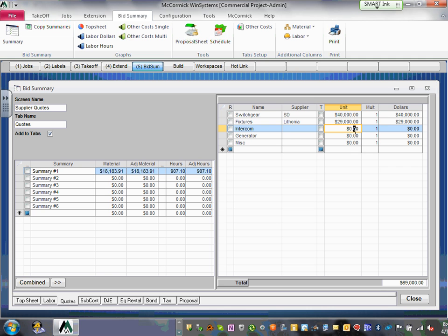Now, where would you get this number? You send it to 4 lighting vendors. Your lighting schedule, Adam. You put your lighting schedule, and they give you 4 quotes, and you pick the one that suits you, typically the cheapest one, but doesn't have to be. If I work for Davis and Associates, guys, and they always give me a good price, and this time they give me 2 grand higher than somebody else, they treat me good in every project.